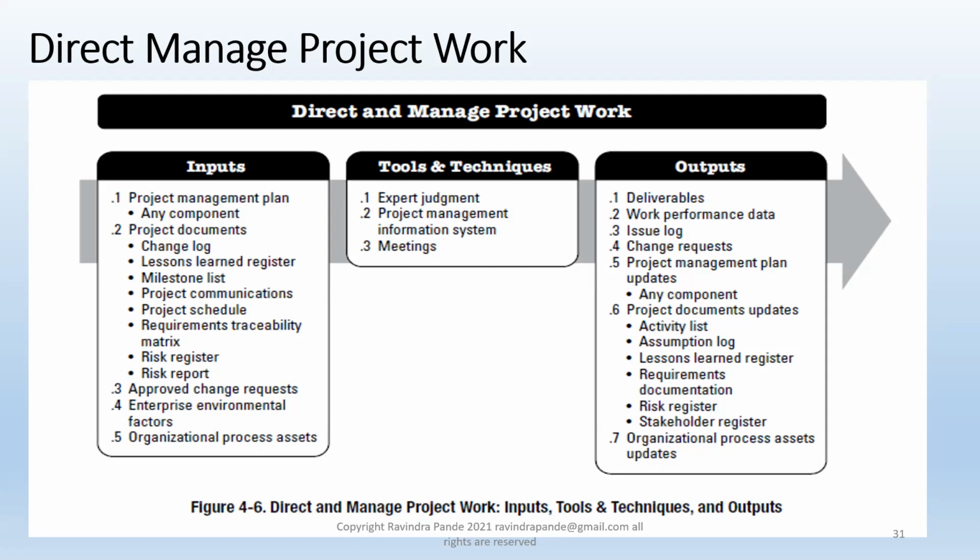In case something goes wrong, we might escalate this to the top management, saying, hey management, I might require one or two people, because there are too many change requests being given by the client. Then the top management might initiate a new contract, something like a time and material type of contract, where we are giving two more resources for this project, but these resources will be charged at $40 per hour, over and above whatever we are charging in terms of the total project cost, because you have shared extra additional work than whatever we have planned for.